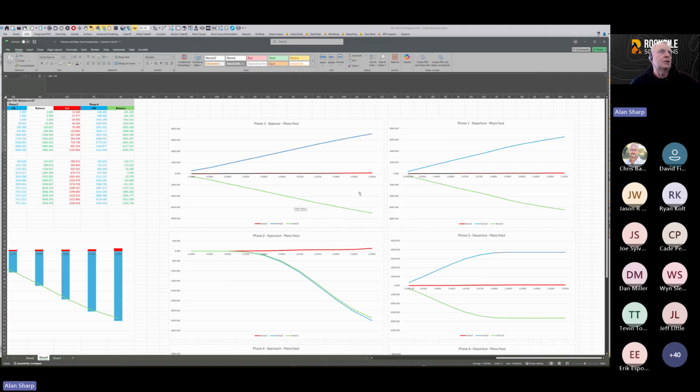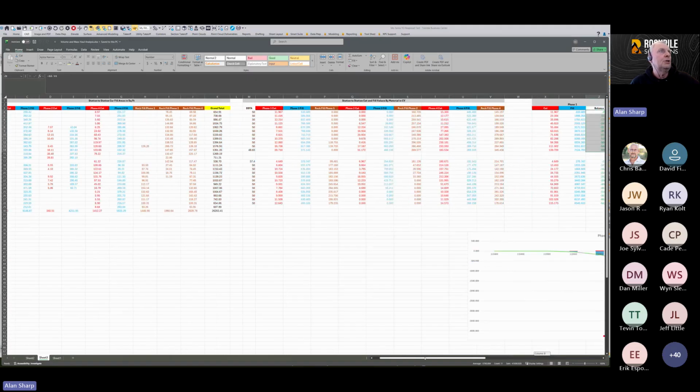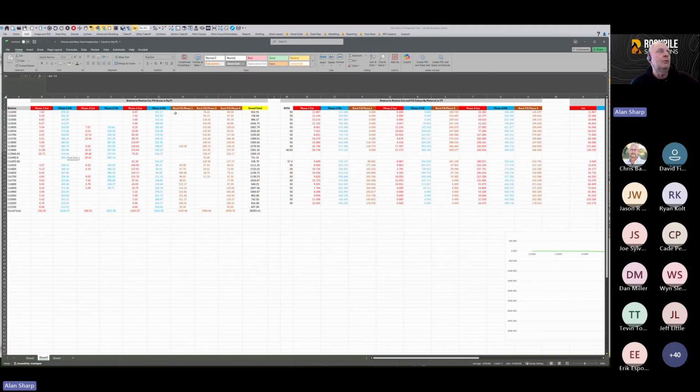This is just some examples of reports, and this took me about 5 minutes to do from the generation of the report from the takeoff quantities of those cross sections. So take the cross sections, build the report, open it in our tool in SmartPane or something, copy and paste the data, build a pivot table, use the pivot table to create the raw data, and then do the calculations. And again, my goal isn't that you do it this way.